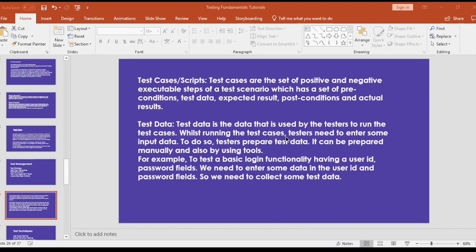So within the iteration period, what you are testing is various functionalities. It's not different testing that you are doing. You've gathered a few functionalities for that sprint period, maybe for 2 weeks. So they develop, you test, you do your retest, and then you do your regression testing, and that's it. And then you pick another functionality again.